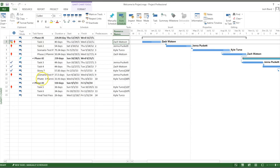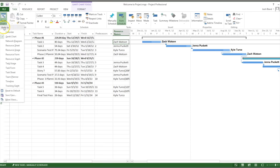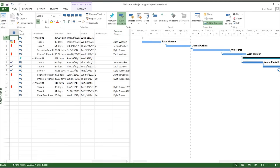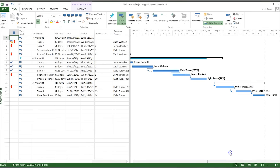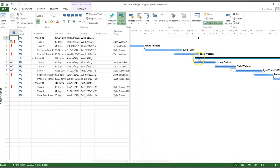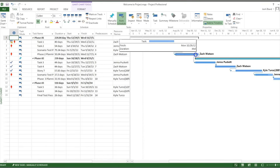One of the best features of Microsoft Projects is the way in which users can interact with this information. There are multiple view modes available in the Team Planner tab. Perhaps the most traditional view, the Gantt chart displays the task's basic information alongside its duration and assigned resource. Projects has the ability to auto-schedule based on where tasks are dragged throughout the timeline.